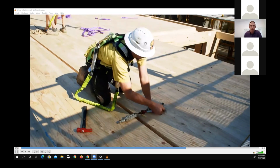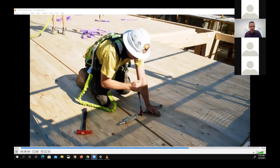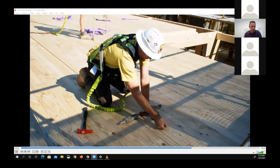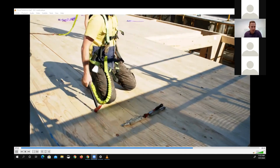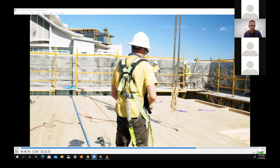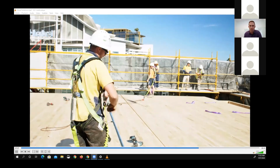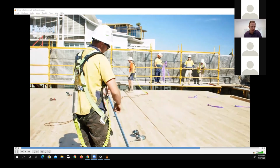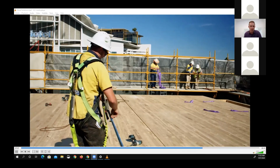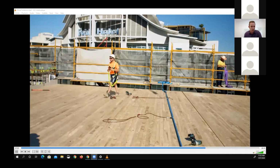That did require us to create some space, and because this building was on a long, narrow site and we're built pretty well out to the boundary in all faces, that required us to build some elevated platforms to locate those. And we were lucky we had some friendly neighbours that were very generous with their backyards. I would suggest for those builders out there and other people considering what you can use to most efficiently unload and load up the panels, you'd probably need to have two spaces around 15 metres by about 7 metres wide to be able to land the timber, just so you can sort it and have it brought up in the right sequence. And as you can see with these panels here, we're not loading up the deck; they're very clear and open, which allows for efficiencies on site.